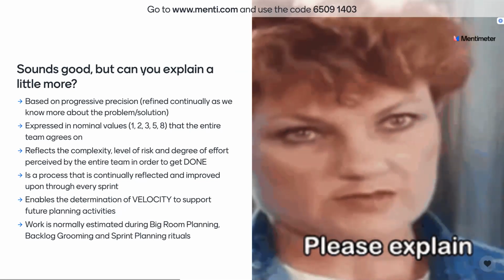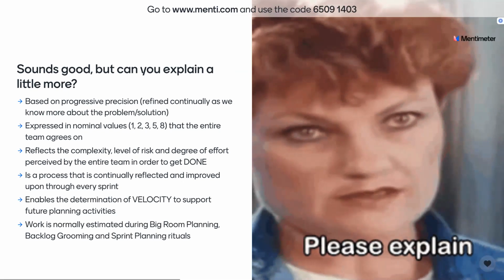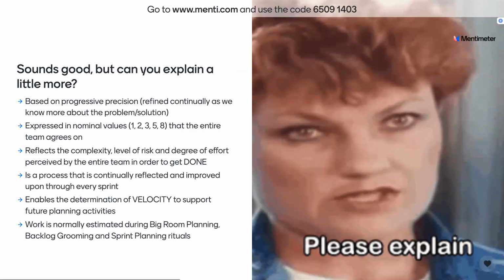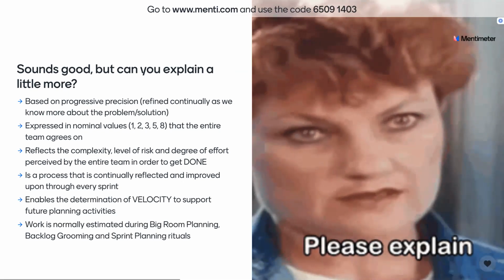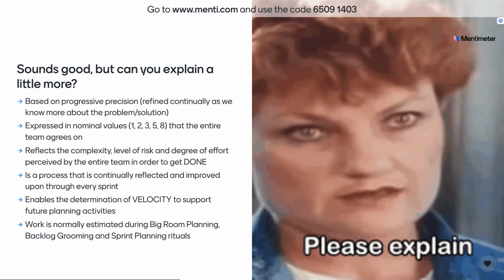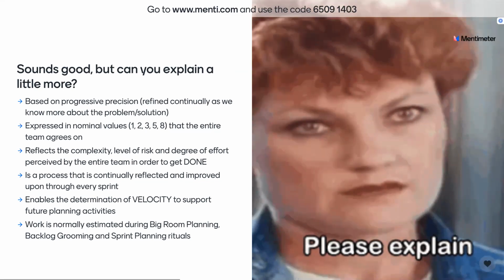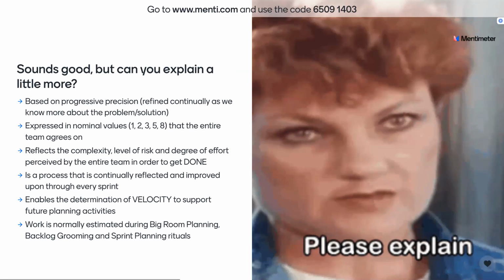If we don't do that, then of course we're going to get caught estimating the individual tasks, how long they take, adding it all up and providing that through. And as more evolves, you might go, oh yeah, we've got more tasks that we've got to do. We didn't think of that. Therefore, more tasks, more time, and estimates continue to go up and up. So it's trying to take some of that time away.